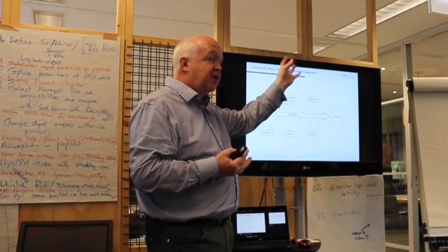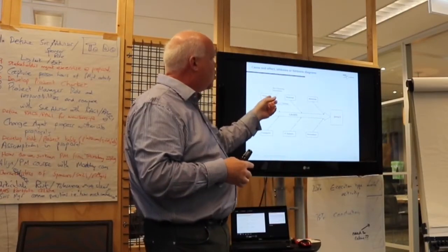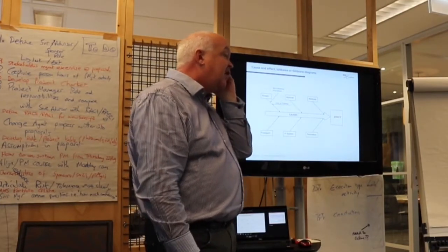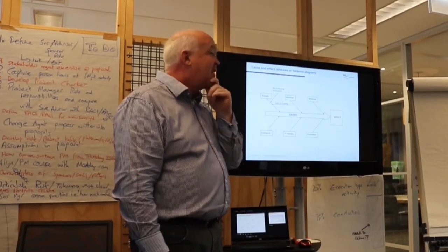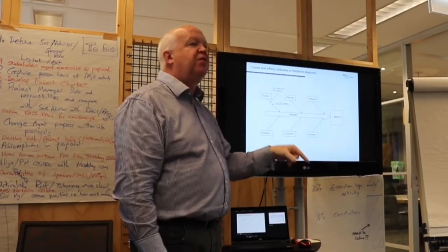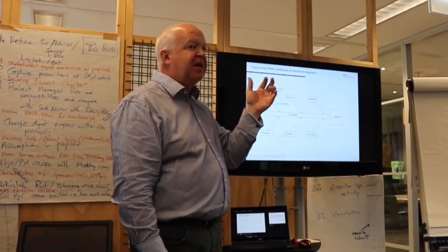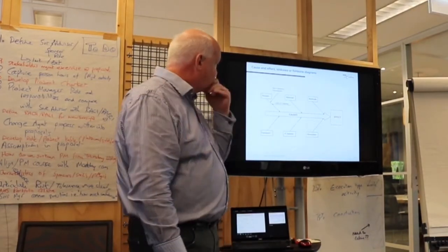It's actually like a work breakdown structure. So the cause is at the top, and then you just break it down, and you get down to the core issue. Now there is a technique called the 5 why technique. Have you heard of that? Yes. If you ask the question why 5 times, you generally will get down to the core root problem. So don't just ask once and accept the answer. Ask why 5 times.